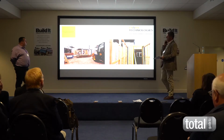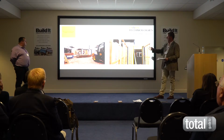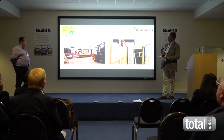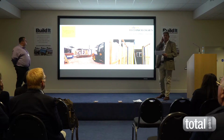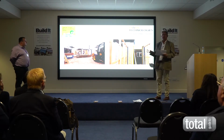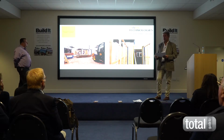So at the end of day one, the ground floor panels were nearly stood. As you can see in front of the forklift, the steelwork's all there. The majority of our frames are erected with a telehandler. It gives us a lot more flexibility than cranes. Some sites you've got to use cranes, it depends on the design, but where some companies say they'll only use cranes, at the end of the day you can hire a telehandler for a week for the same cost as a crane for a day.